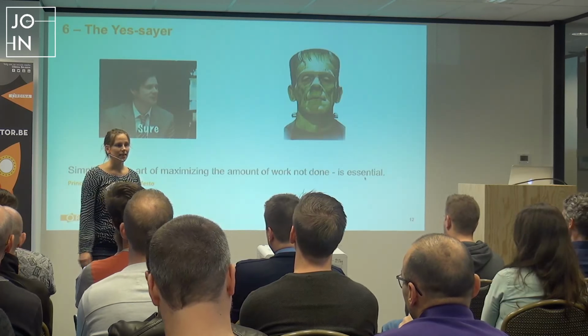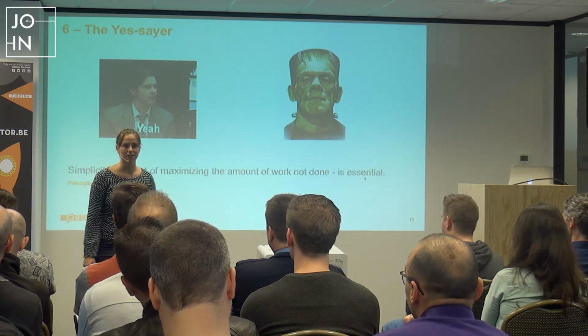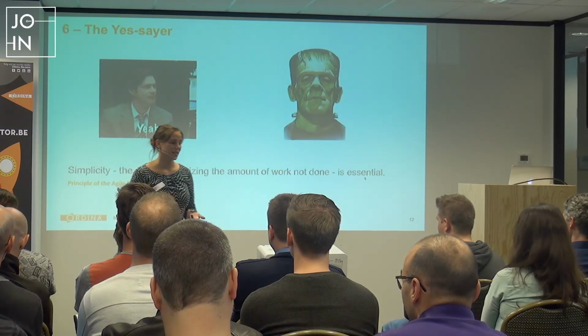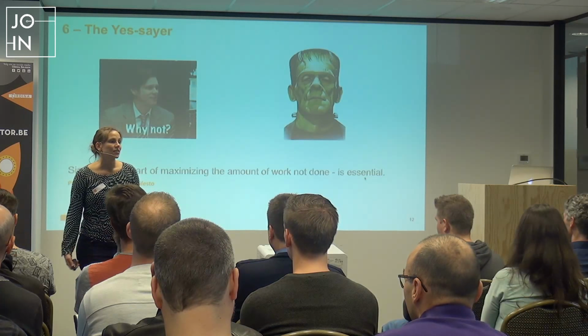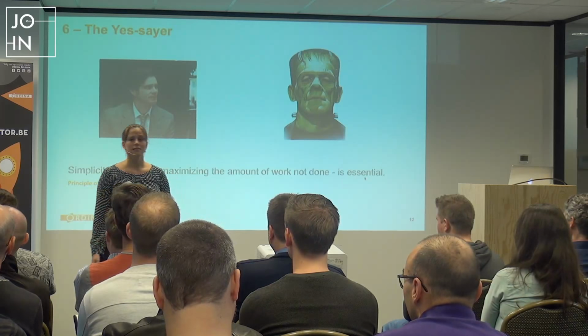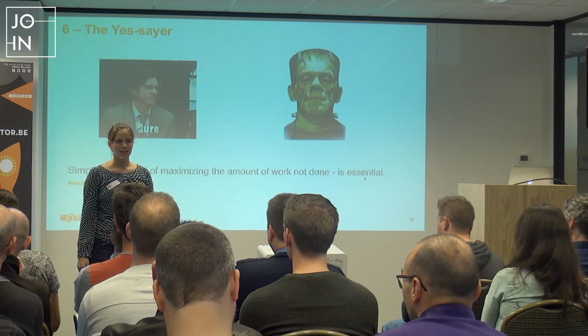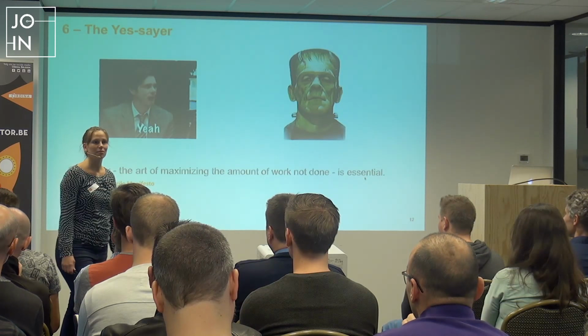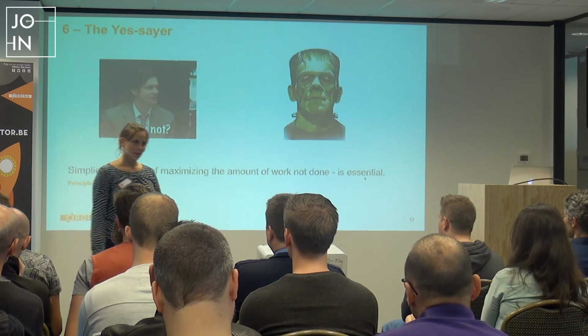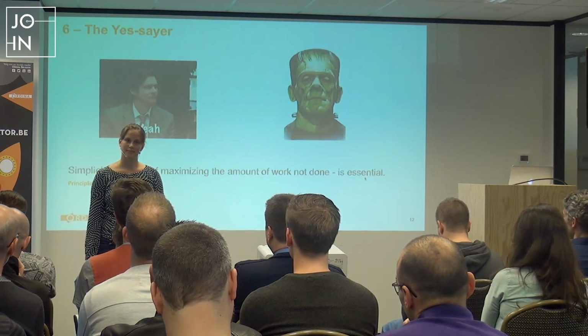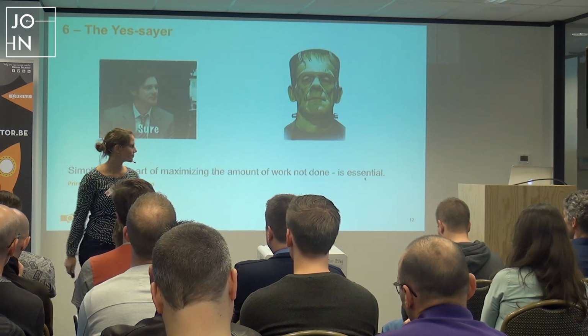Or it's just a lack of self-assurance that can be the reason why this product owner doesn't say no. You should challenge user stories that, in your vision or in the vision of the organization, don't add value. Please do. The discussion you have on a user story that you're not doing takes much less time than if you implement it, ask your customer, it doesn't work for him, and you have to remove it again. Have that discussion beforehand.